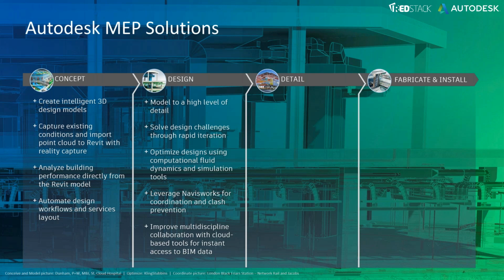And then towards the bottom of that list, and I did talk about it just briefly before, about using Navisworks to bring a whole bunch of disciplines together. So within Revit, we do have architectural, structural, and mechanical, but if you are using something like Civil 3D as well to maybe do the car parks, then we can use Navisworks to bring the civil model together with the Revit file and then run clashes on everything, and then determine the clashes before anything happens out on site as well.